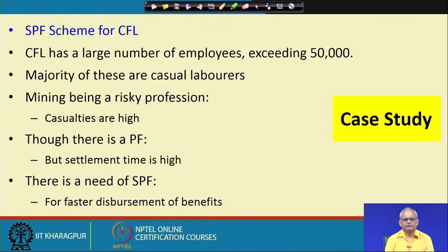So, that is to propose alternate solutions, and then find out the cost for each solution, do the cost benefit analysis, check whether schedule wise it is feasible and technically feasible, and then find out the best solution, and then discuss with the customer and determine whether to go ahead or abandon the project.